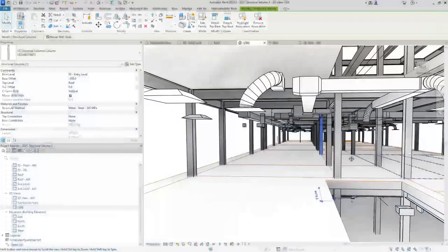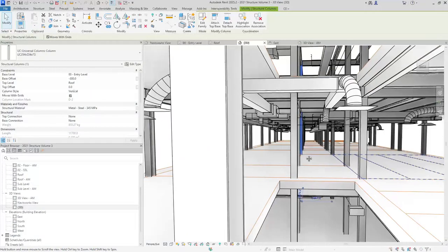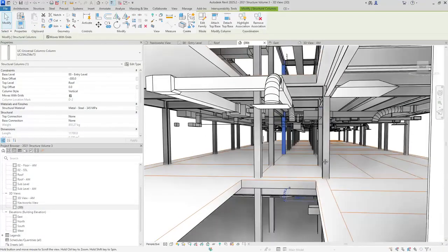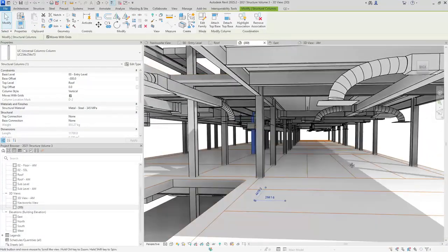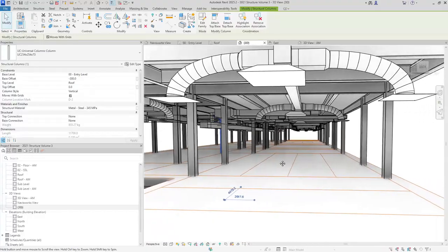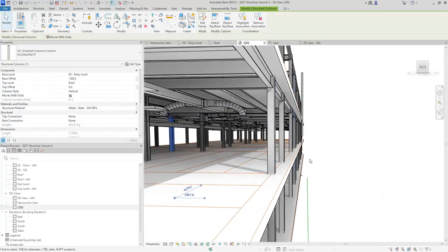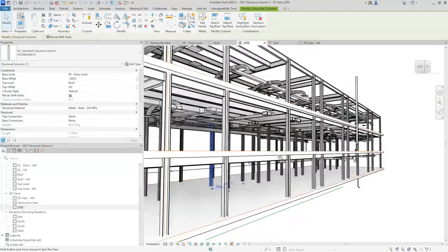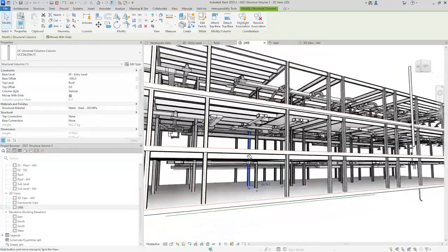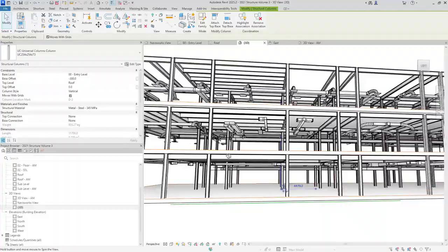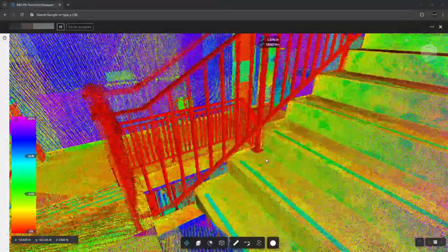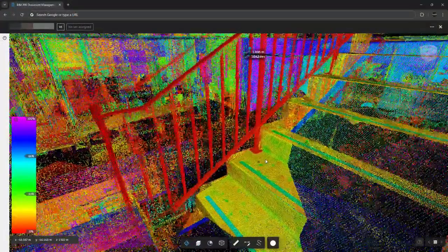The BIM model is not discarded now that construction has started. As work progresses on site, the 3D BIM model is continually updated with any changes to the physical asset, such as alterations to pipework location, even just millimetres out of place, can have an impact on future use of the digital and physical asset.